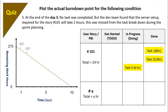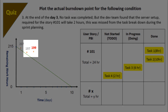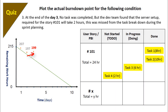Next, at the end of day three, no task was completed but the development team found that the server setup required for story number 101 will take two extra hours. This was missed from the task breakdown during the sprint planning meeting. So you need to plot the actual burndown point. Many times it happens that the development team is not able to foresee each and every task of the story. However, the day it is identified, it should be added to the task board. This task will add to the remaining work, hence instead of going down, the actual burndown chart will go up this time.